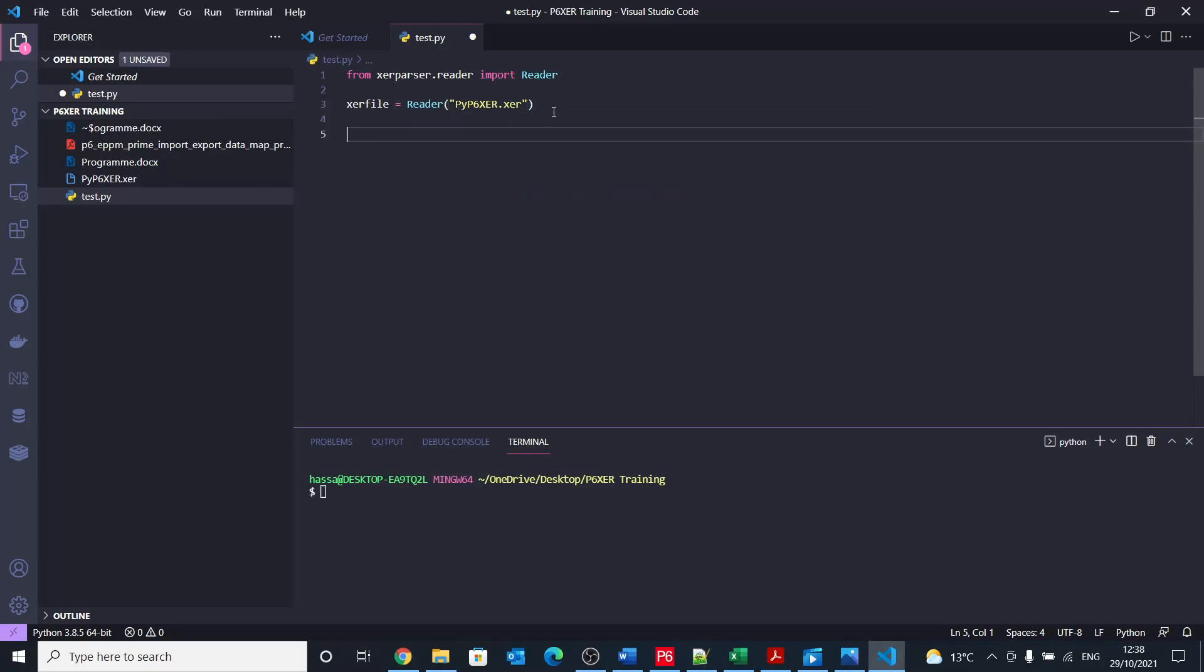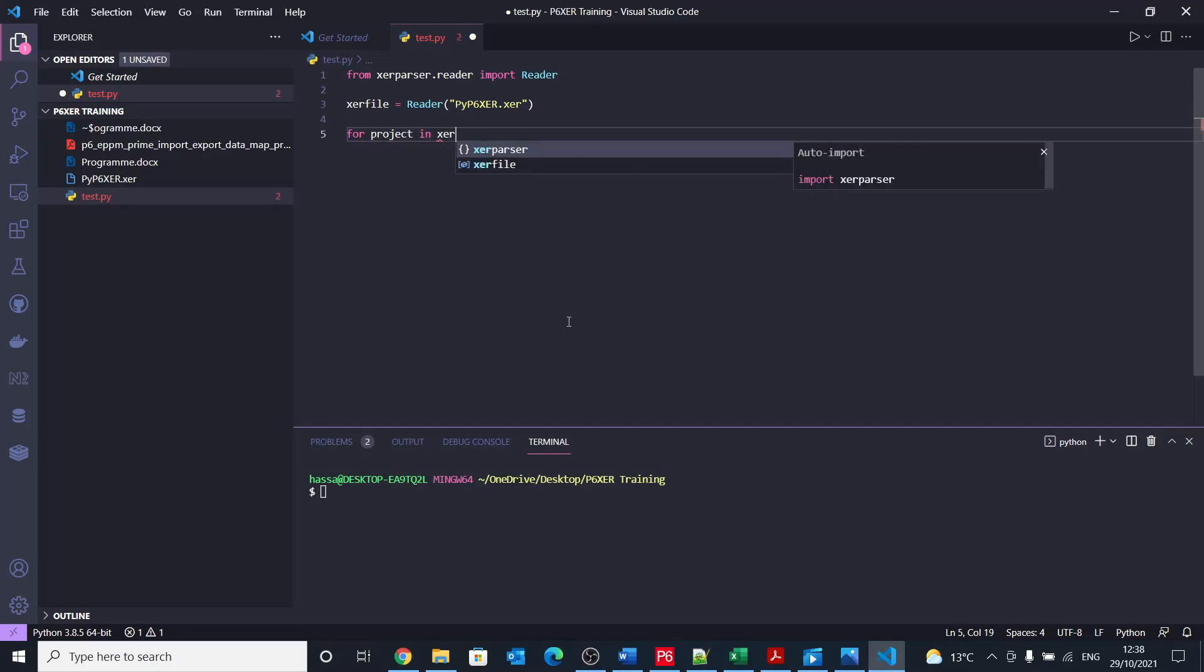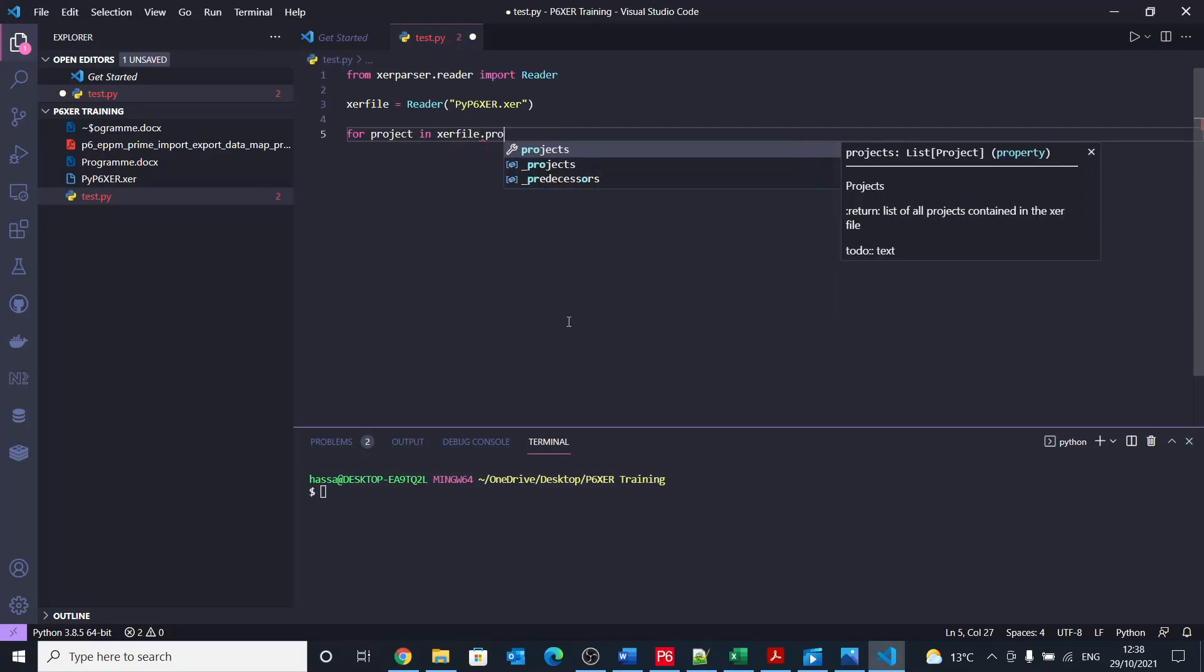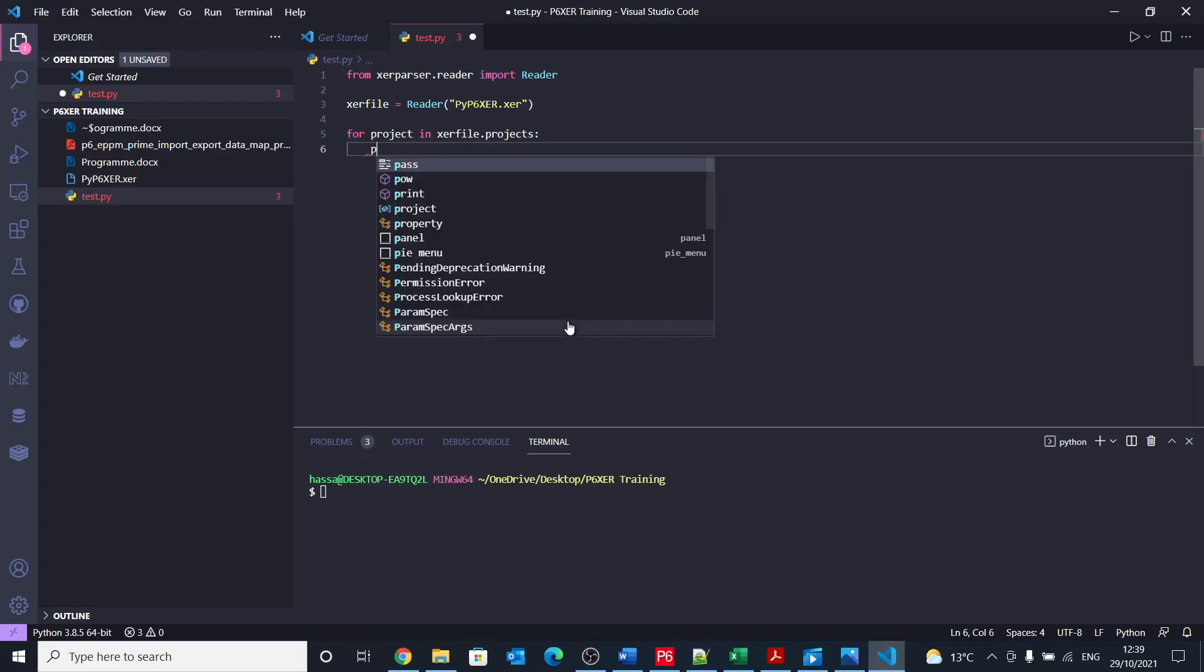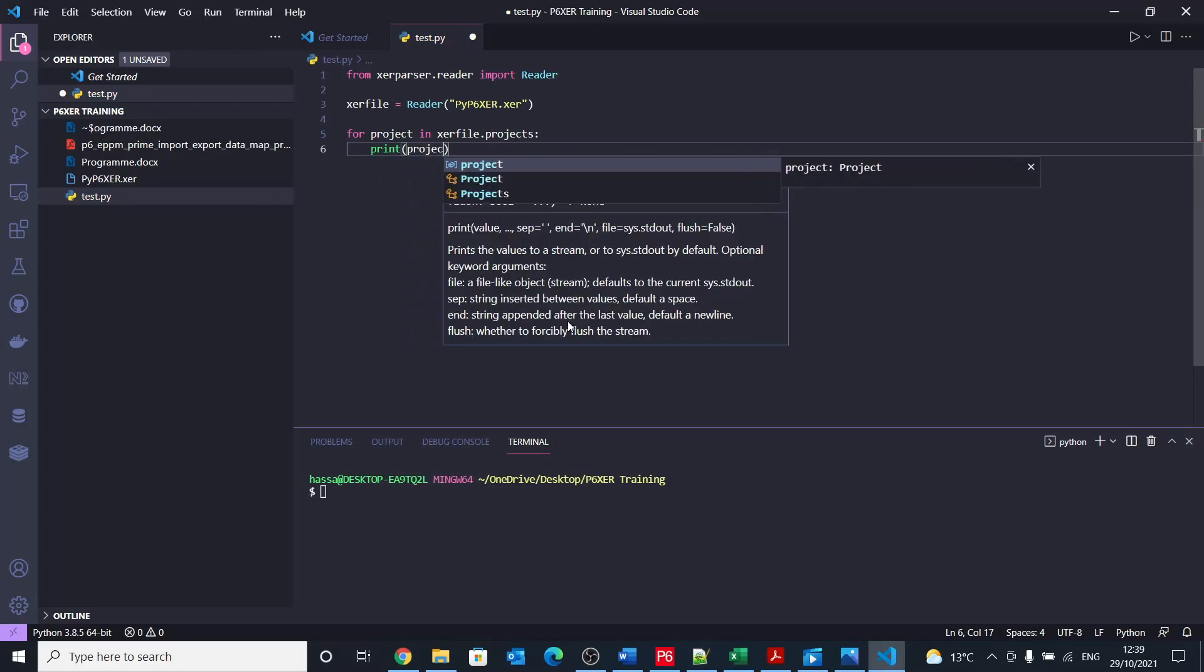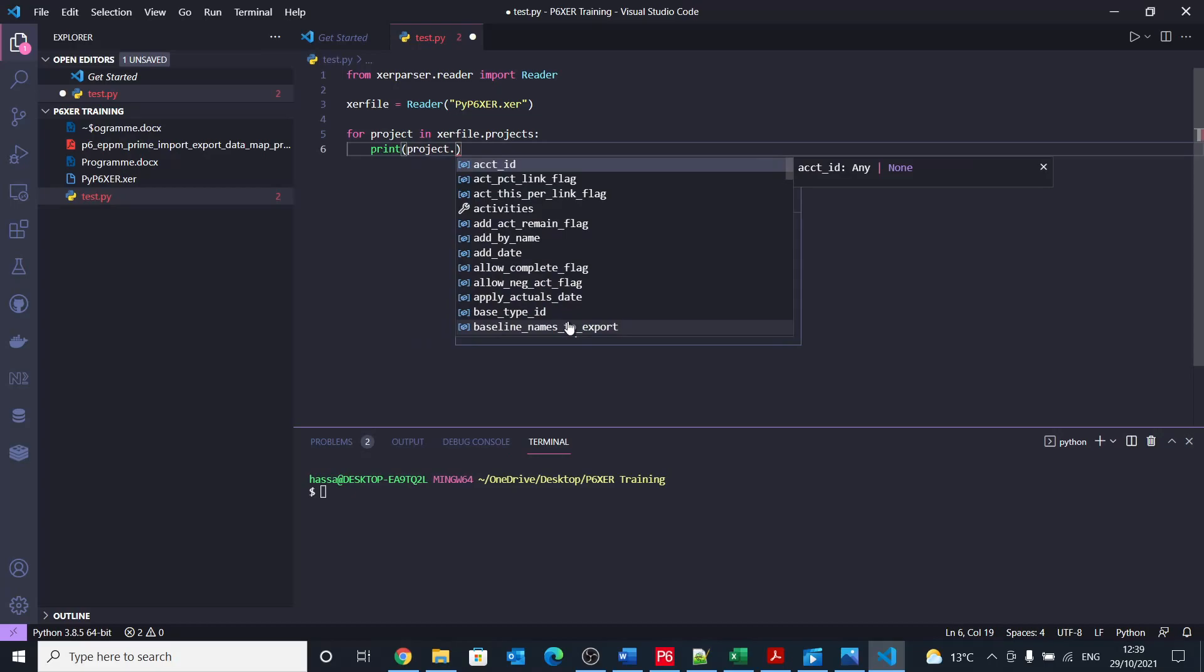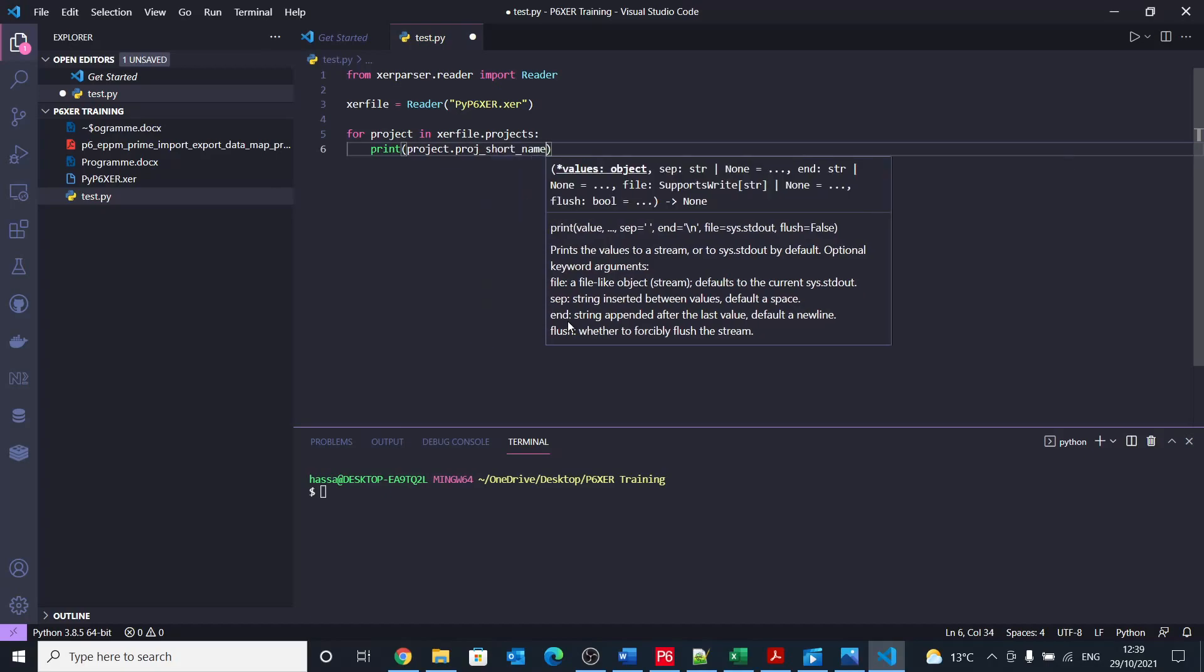So now we have created the reader. After that, we now have all the file stored into that variable xcr file. So let's start with printing or getting the projects within that xcr file. In order to do that, we just need to loop through all the projects in the file. So I would say for project in xcr file dot projects. So here I'm saying that go and fetch all the projects, and then give me one by one of these projects.